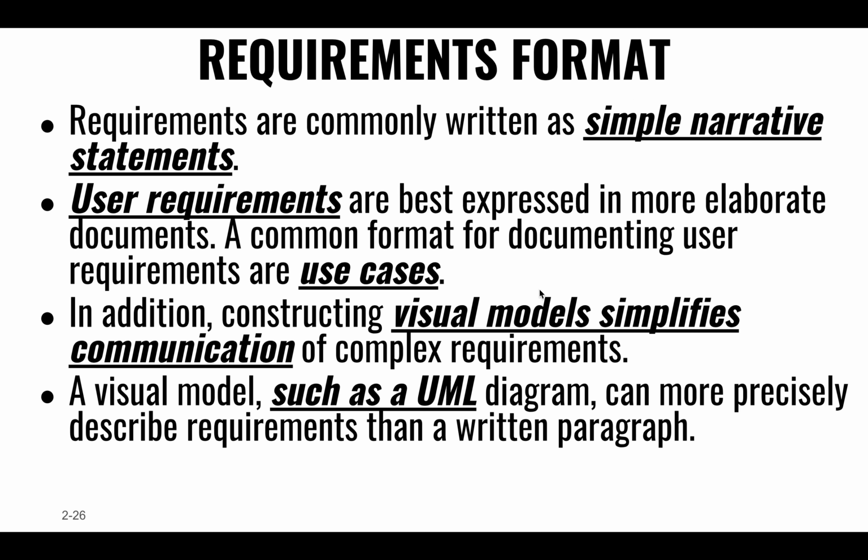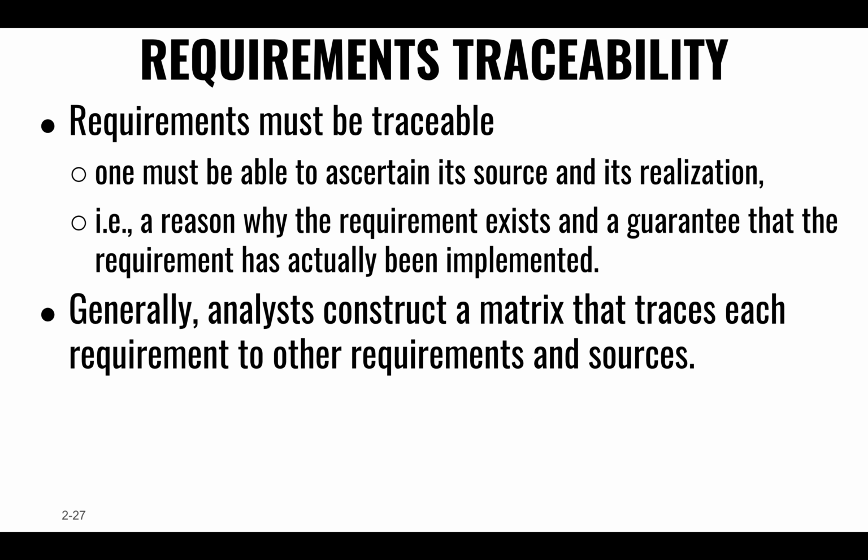And also the UML, the Unified Modeling Language, right? It is the industry standard set of diagrams that are popular for capturing or documenting use case analysis, and that's what we're going to be using in this assignment. Traceability, as I mentioned earlier: these requirements will have some unique identifier that allows you to make sure that every single line of code is related to some requirement that's being implemented.